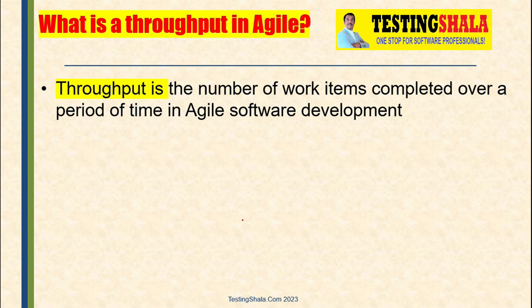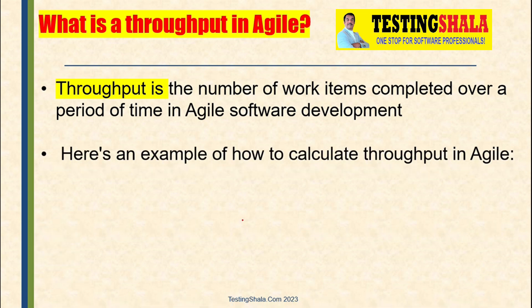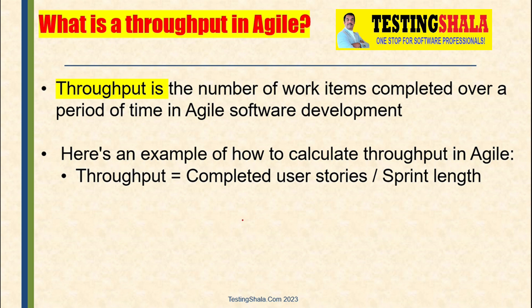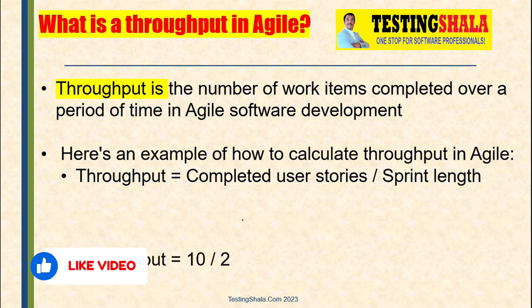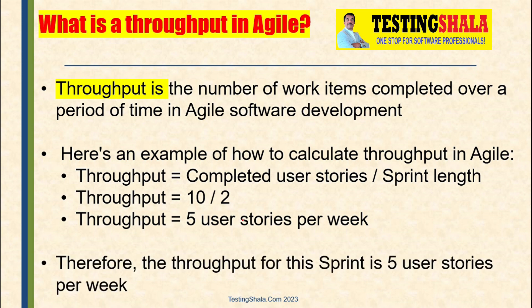What is throughput in Agile? Throughput is the number of work items completed over a period of time in Agile software development. To calculate throughput: if we planned 10 user stories and eight were completed over a sprint length of two weeks, then throughput is 8 divided by 2 weeks, meaning we can deliver approximately four to five user stories per week. This is all about throughput in Agile.